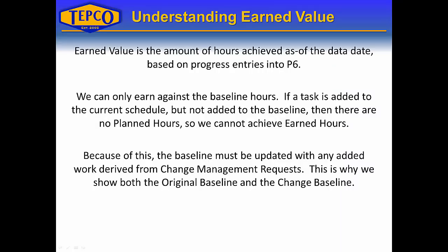The next component in the S-curve is the earned value line. The earned value is the amount of hours or cost achieved as of the data date based on progress entries into P6. You can only earn against the baseline hours. So if a task is added to the current schedule but not added to the baseline, there are no planned hours in the baseline and we cannot achieve earned hours. The baseline must be updated with added work derived from change management requests.